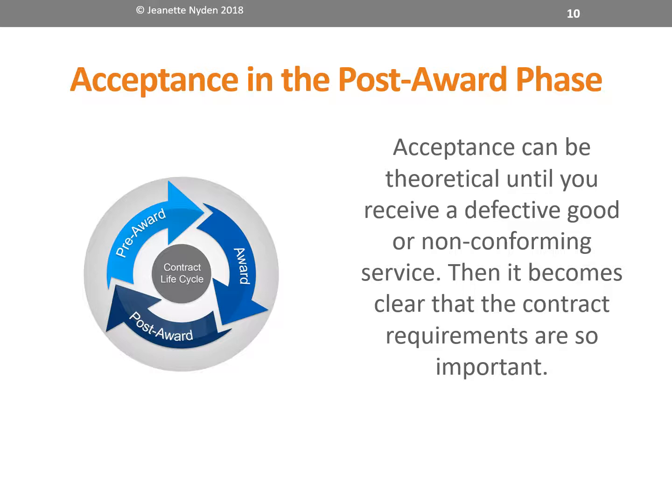That's why this is part of the Contract Professionals Playbook, because if we don't write good requirements, we can't manage good requirements. And acceptance is one area where I personally feel we, as a team, as a profession, do not write good acceptance criteria, and therefore it is very hard to manage. And that's why lawyers push back and say, hey, we can't terminate for cause for a breach because we don't have good enough requirements to establish what the law would consider a material breach of the agreement.